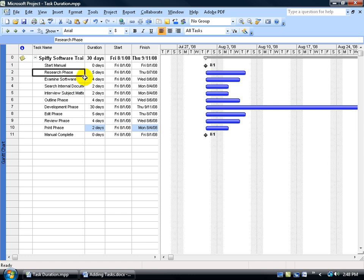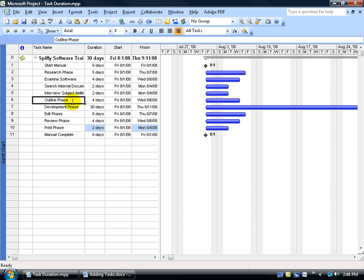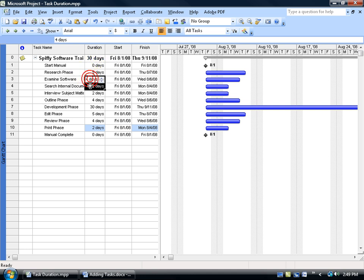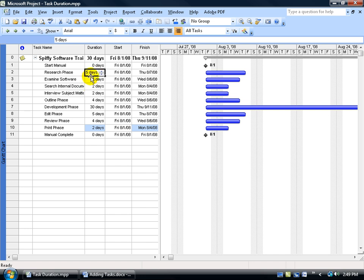So, just know the flexibility of that. For right now, I'm going to assign the numbers to my phases, and then when I do, later on, add additional subtasks, the moment that I convert this into a summary task, where Microsoft recognizes it as such, it'll actually wipe out the numbers here, and do what the project summary task is doing up above. In other words, it will wipe the number for the research phase, and just keep track as a summary task for all the detail subtasks listed below. What's the longest task here? Four days. So, by default, when I do convert this, it'll say four days is the summary for all these three subtasks down below.